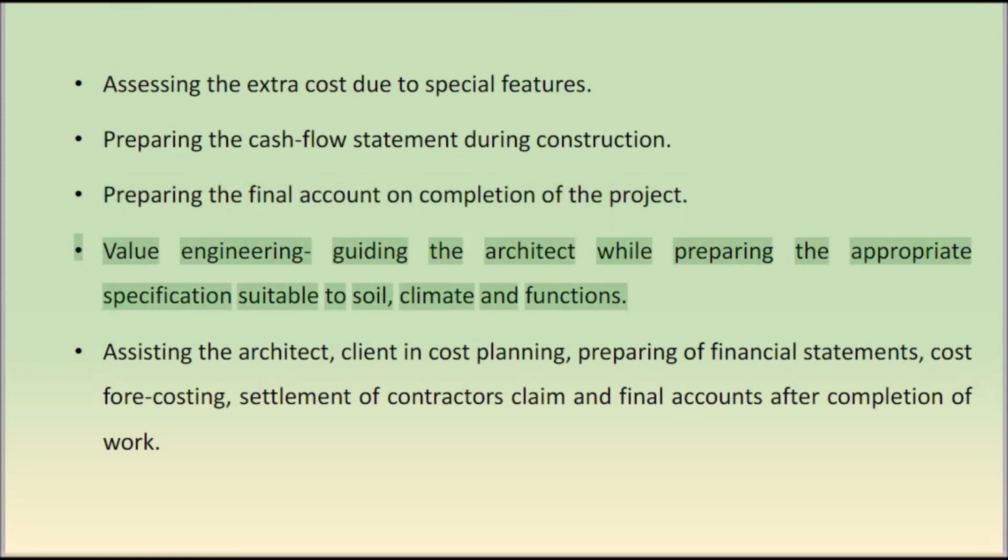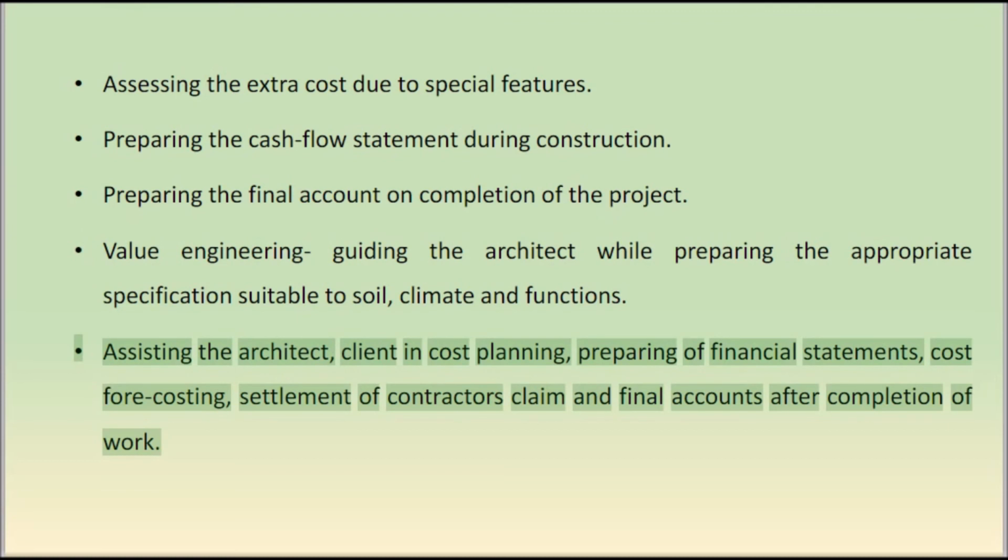Value engineering, guiding the architect while preparing the appropriate specification suitable to soil, climate and functions. Assisting the architect and client in cost planning, preparing of financial statements, cost forecasting, settlement of contractor's claim and final accounts after completion of work.